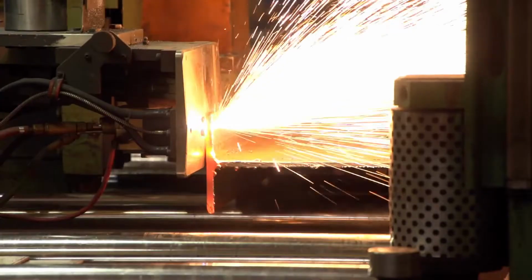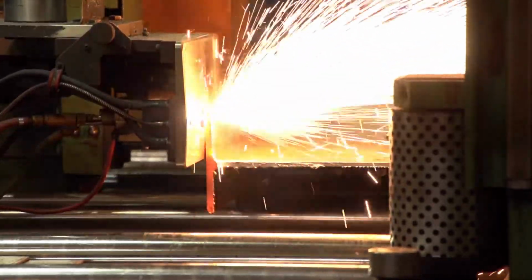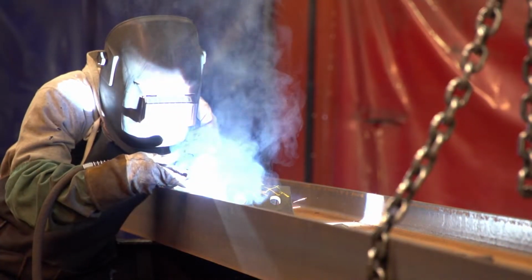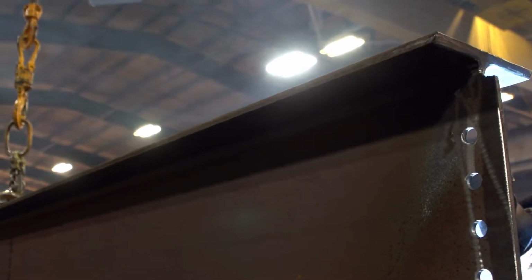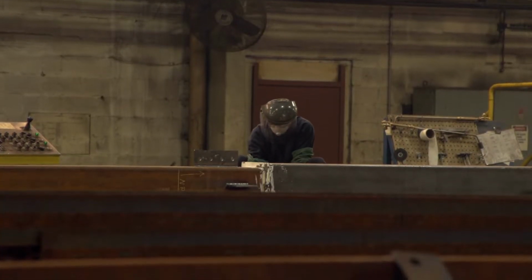To get the project started and to stay on schedule, we begin creating the beams and columns for the rest of the building in our model, working with general contractors to try to get final mechanical specs as quickly as possible. If all goes well and we receive mechanical information in a timely fashion, we can produce all beams and complete the floor and roof framing. It's much easier and cost-effective to detail this steel as we work through the building and avoid having to come back to complete this work, which also minimizes the potential for errors.